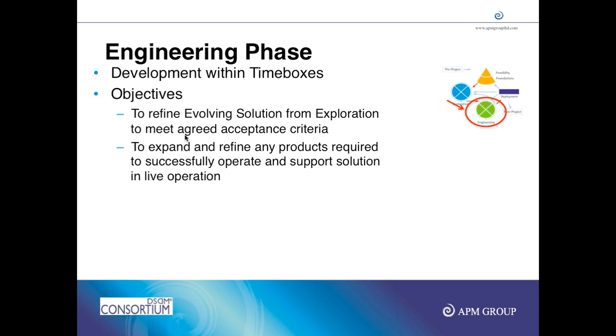So, step one, I pick up a requirement. So, for example, the first time box. As we step inside the time box, first day we look at what things need to be done during this time box. We bring all the business stakeholders like the visionary or the ambassadors together. We take each user story, like the user should be able to pay online. We ask them further details about what they have in mind. So, what's basically a functional requirement of payment solution, which type of payments to be supported, how the receipts will be printed, how the functionality should work, how the screen should look like, and so on.